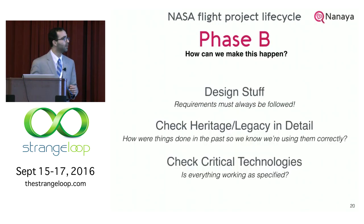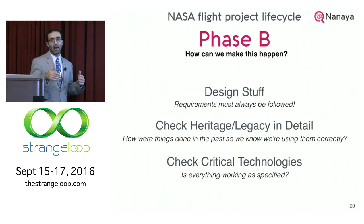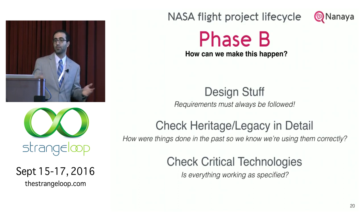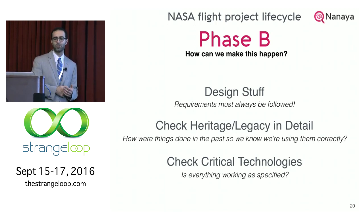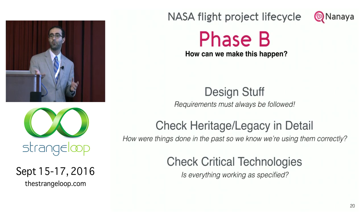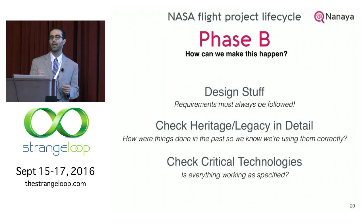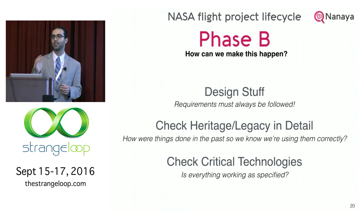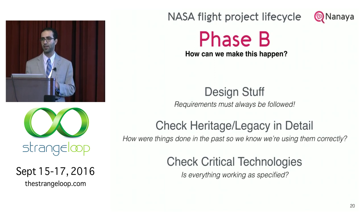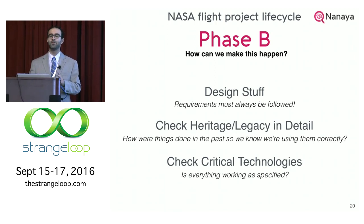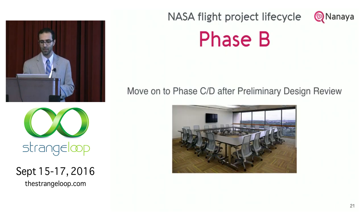After reviews and approval, you continue into phase B — can we actually make this happen? We start designing things, check for heritage like the radio in this example, and check for critical technologies. For instance, the nephilometer from the French is a new instrument using new technology. We have to make sure all technology is mature, tested, and ready in a laboratory and flight-like setting before we even consider putting it on the mission. If it's not, we cut it. One of the biggest reviews is the preliminary design review, which happens before you start cutting things in the shop or writing code, and could be a week-long ordeal.